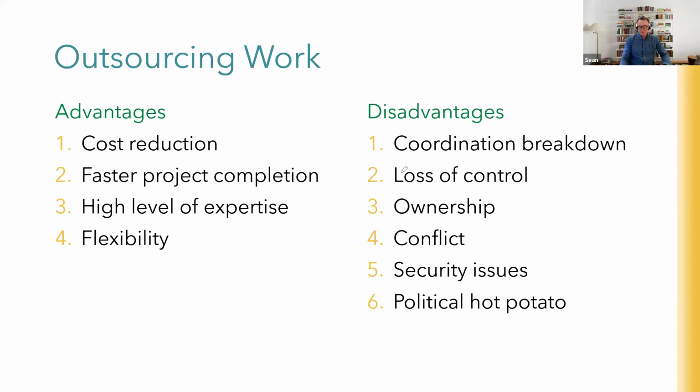But some of the disadvantages too of outsourcing work are you can lead to a breakdown in coordination over the project, because all of a sudden now you're having to manage multiple vendors and their product or service has to arrive or turn up or be completed at the right time so it doesn't affect other project work. So all of a sudden coordinating all of these external people with their own processes, their own organizational culture, their own level of project management maturity, all comes into it and increases risk.